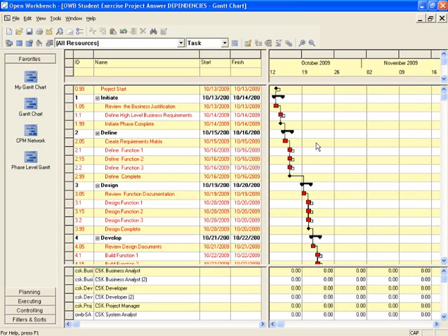As you note though, the way Workbench defaults, it defaults to every task being 1 day. So we haven't done any scheduling in this project yet. We have a bunch of tasks, and they are all 1 day in length, and we have identified the tasks and we have sequenced them out properly, but we haven't done the scheduling. We haven't started the scheduling process yet. We're getting there, and to get to that point, the next thing we have to do, of course, is to assign resources to tasks with their ETCs. So now we'll use this plan to demo that process.